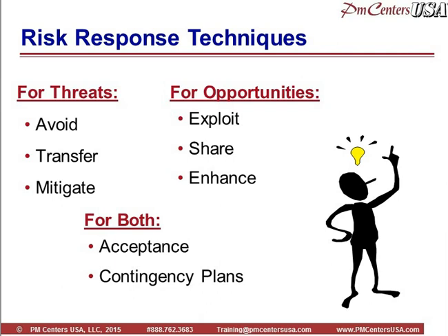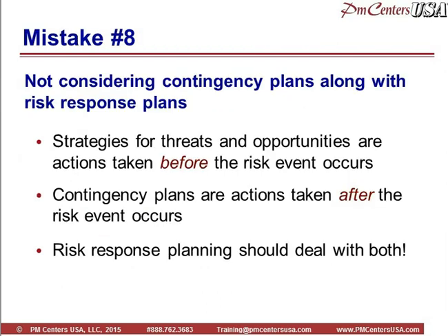And then for opportunities, you have exploit, share, and enhance. And for both threats and opportunities, you have acceptance and contingency plans. So really make sure you're looking at all the potential methods for dealing with risk on your project. Don't limit your thinking to just mitigation.